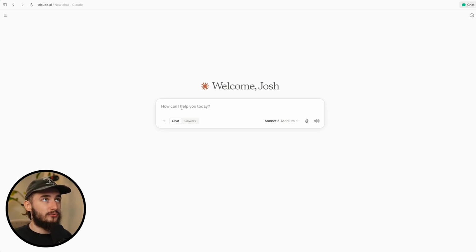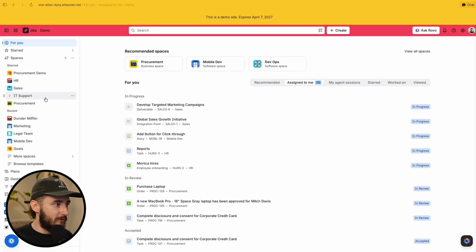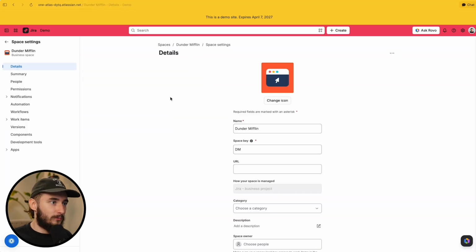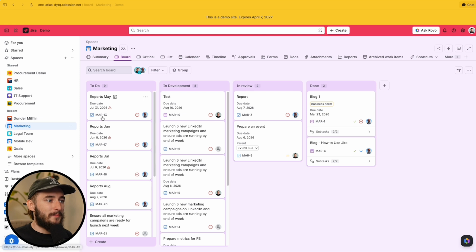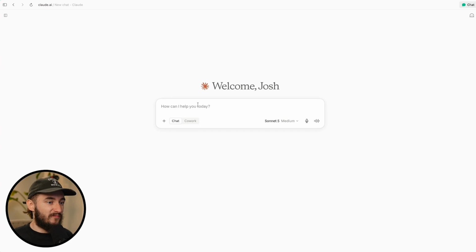Then we're gonna need to make sure to add a summary and maybe a light description if it makes sense. And if it's assigned to Josh, put it in the Dunder Mifflin space. If it's assigned to Selena, go ahead and put it into the marketing space. And the keys for that, just so you have that context, I'm gonna pull up the keys right now. So for the Dunder Mifflin space, the key is DM. And then for the marketing space, I could have just looked at the work item, it's MAR. So that's my keys. That's exactly how we structure these spaces. And fairly simple, just give me the prompts. Don't do any research into my own environment because this is actually a different environment. I just need purely a prompt.